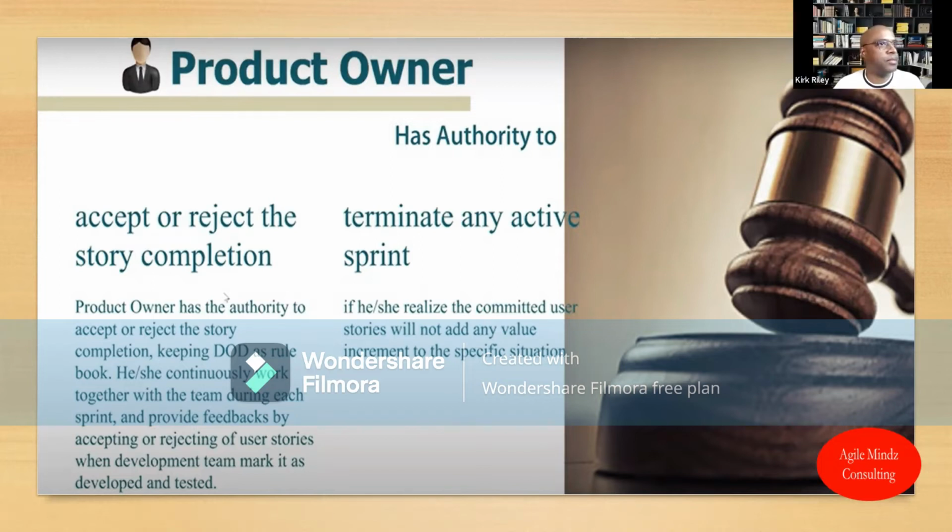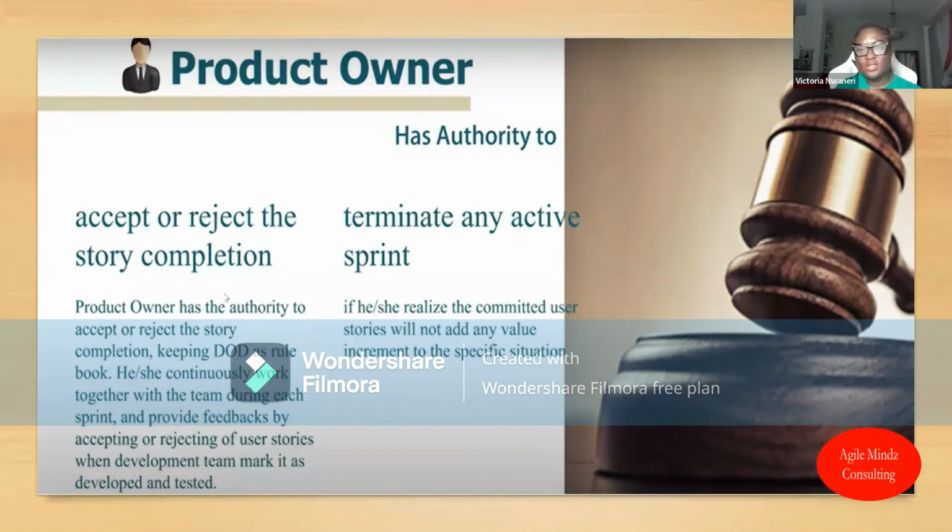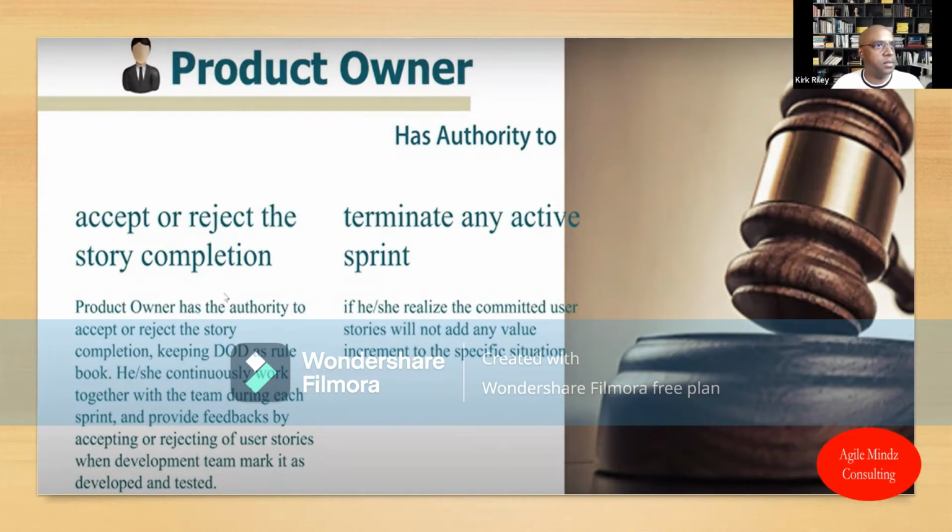Technically, it's probably towards the end of the sprint, probably in your sprint review or demo, where you see that this story does not meet what the acceptance criteria has listed or does not meet our definition of done. Then of course we cannot mark that story as done because it does not meet those criteria. So it's usually during a sprint review, but definitely not during the daily stand-up.